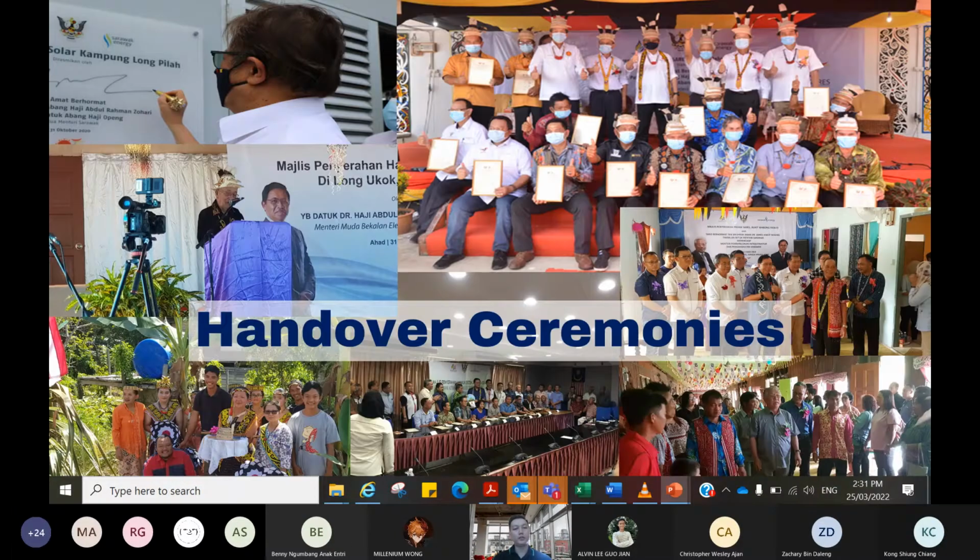Next one. After everything is done, testing and commissioning is done, and the training is also done, we have a handover ceremony. This handover ceremony is to officially hand over this system to them, and also to celebrate this project. We will invite the YB.